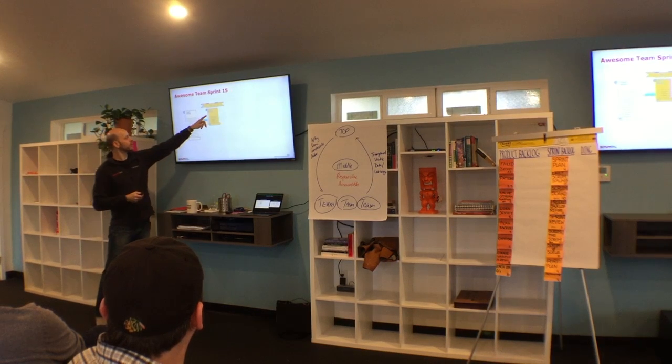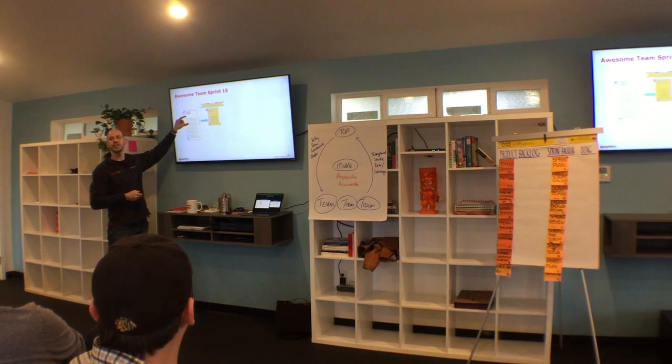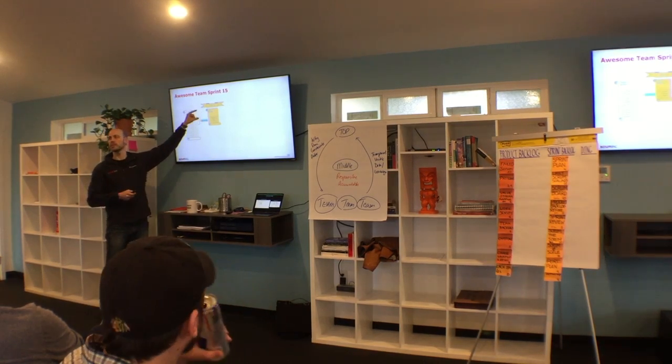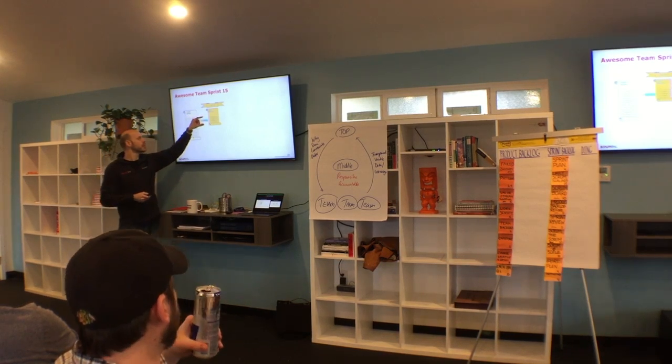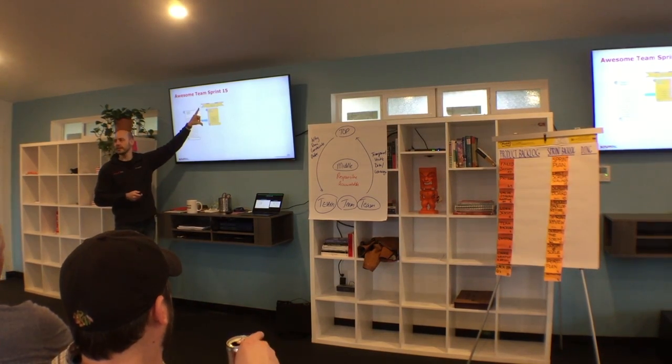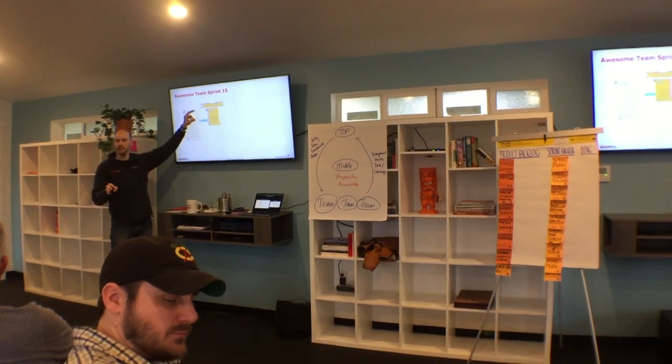The product owner then looks at the sprint backlog. Now that's simply sized just by the yesterday's weather of the team, their last 3 sprints running average. And if it's sprint 1, they take a guess, right? But it's their last 3 sprints running average. So this is not a negotiation as to how big this is. It's just automatic and easy and quick.